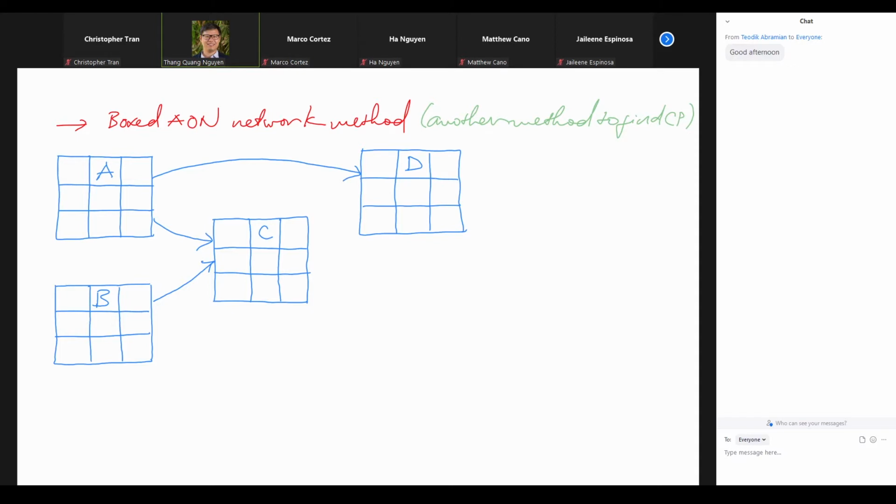And next, we need to choose catering. So we have another box for E. And to choose the catering, we need to decide on the date. So we have one arrow going from the date. And we also need another arrow going from the guest list, because catering means cooking, and they need to know how much food to cook so that everybody will have something to eat, right? So we have that E with the two arrows going to E.